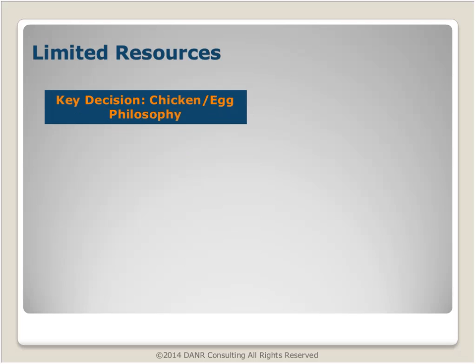Well, the first is the organizational decision, which is what I kind of call the chicken or the egg philosophy. Do you hire your resources before you have the work, or do you wait for your work before you hire your resources? There are project impacts to each approach. If you wait to hire until you have the work, then you're bringing in new people who have to learn the organizational structure, have to learn your business processes and work processes, have to get to know their teammates, and that's a lot to burden a project with, and that ramp-up time can increase your project cost and potentially affect your schedule. The alternate approach means you have overhead burden because you brought somebody in prior to the workload, and